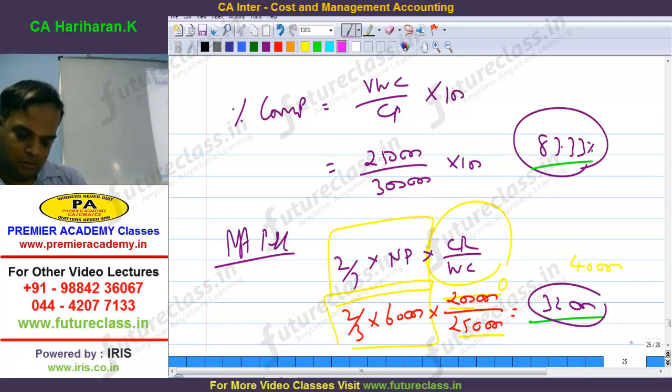Compute a conservative estimate of profit on contract, 80% complete from the following particulars. Illustrate 4 methods of computing profit. Total expenditure to date 1,70,000. Estimated further expenditure to complete the contract, including contingencies 34,000. Contract price 3,06,000. Work certified, cash received 1,63,200, and whole amount is 2 lakhs. Work not certified is 17,000.